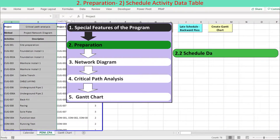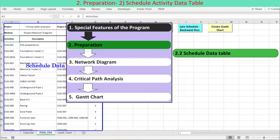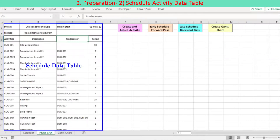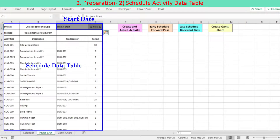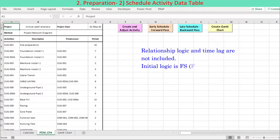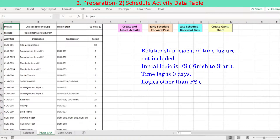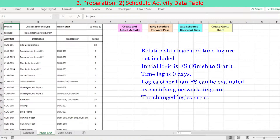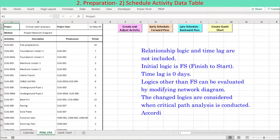The activity data table consists of four columns: activities, description, predecessor, and period. At the top, the project start date is required to be entered. Relationship logic and time lag are not included in the activity table. Initial logic is FS, finish to start, and time lag is zero days. Logics other than FS can be evaluated by modifying the network diagram, and the changed logics are considered when critical path analysis is conducted. Accordingly, the Gantt chart is generated based on the changed logics.